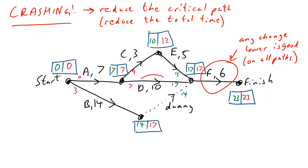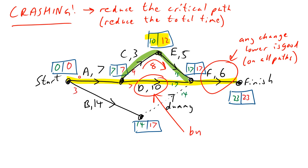Now let's look at D. Remember the green loop has a total of 8 and a float of two. Comparing the green loop (8) to the critical path through the middle (10 for D), you can change D by a maximum of two — you can crash D by a max of two, because that's the float on that particular route.